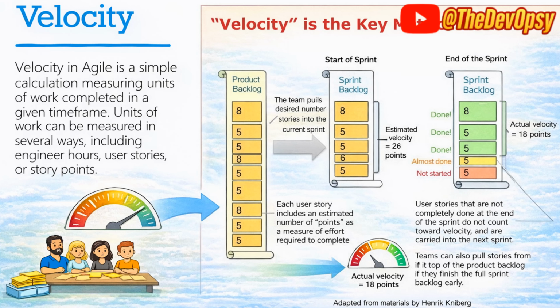And when you actually do the backlog planning or sprint planning, you make sure that once those tasks are broken down, once you have estimated the story points, 8, 5, 5, 3, the total number of story points which you have taken into consideration for that particular sprint is the estimated velocity of your particular sprint, right? So that is the estimated amount of work which you have taken into consideration for this particular iteration, right?